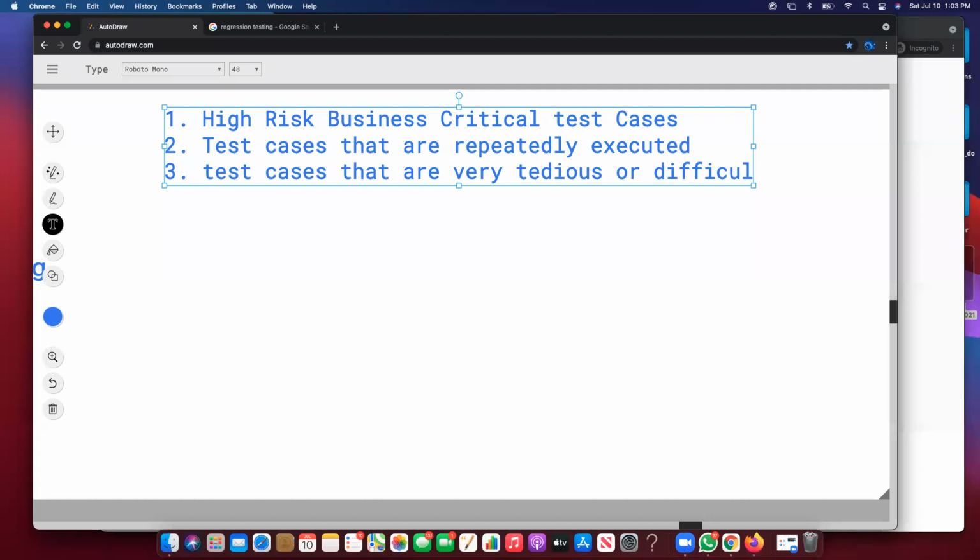You want to be able to explain why you're going to take such a long time. You want to say, look, you want to lay down the options. Here are the 500 test cases. We executed 300 as a regression. We have 200 left. And at this point, we didn't find any critical bugs. But if you guys want to go for a release, there is a risk.